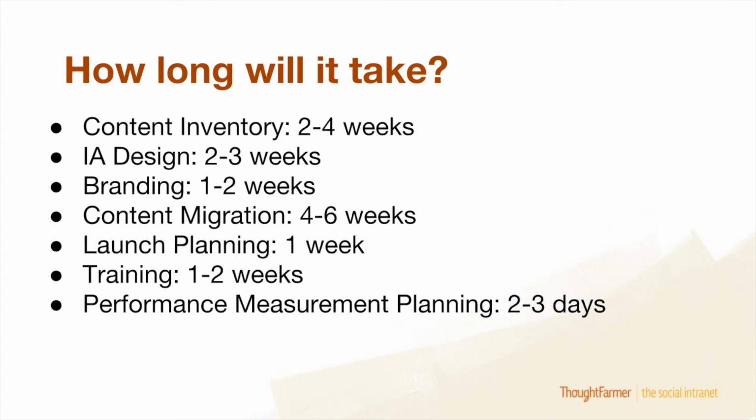And like I said there too, a lot of it depends on how much content you have. We had one client in the recent past who came to us with somewhere along 100,000 pieces of content, documents that they needed to migrate into their new intranet. That took weeks, right? I think they were around 8 weeks of migrating, solidly migrating content every day and having people that worked on that for 50% of their time. The number of pages that would take 4 to 6 weeks is difficult to say.